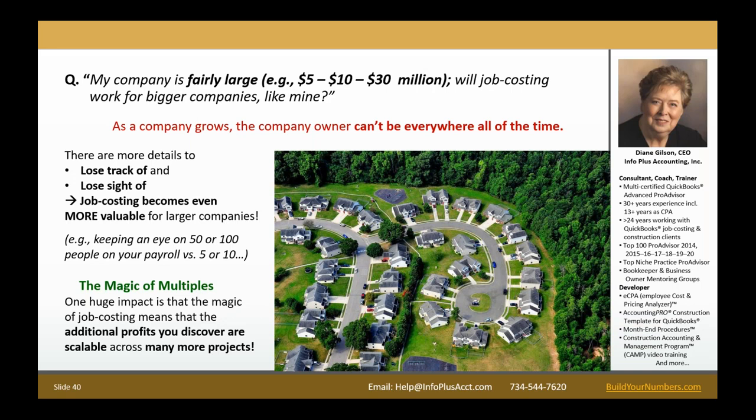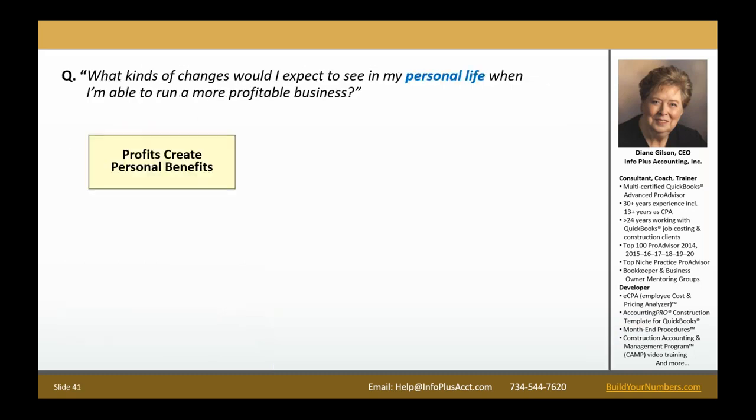If you learn how to save, I had a client that learned how to save about $1,500 on each framing job that they were doing. And over the course of a year, that made a difference of about $187,000 by just being able to spot that one place where they were able to bring in a different contractor to handle the same quality job of framing. So they really got their investment back.